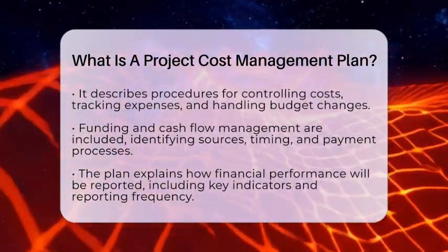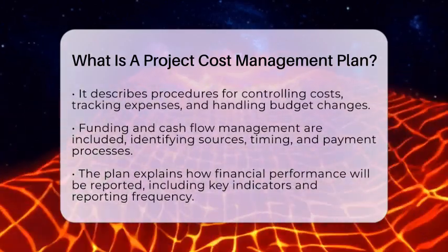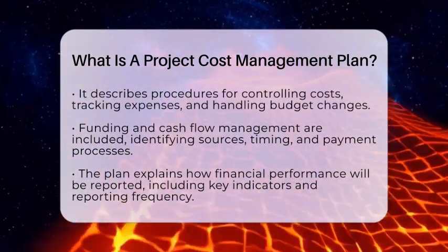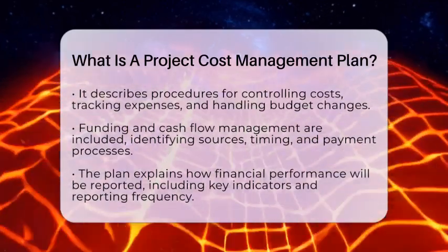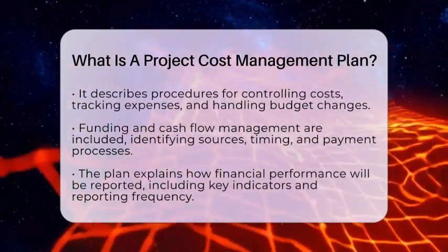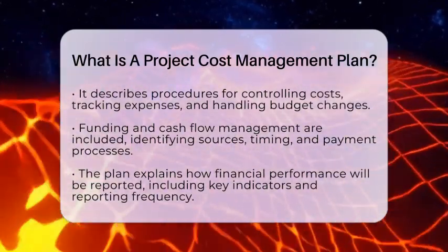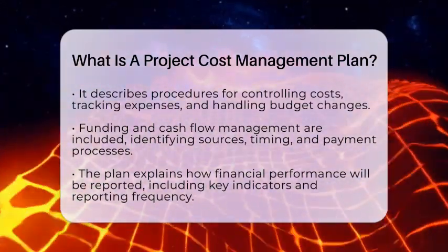Controlling costs is another key part. The plan describes how actual expenses will be tracked against the budget. It sets thresholds for when corrective actions are needed. It also specifies tools for real-time monitoring and procedures for handling changes to the budget.